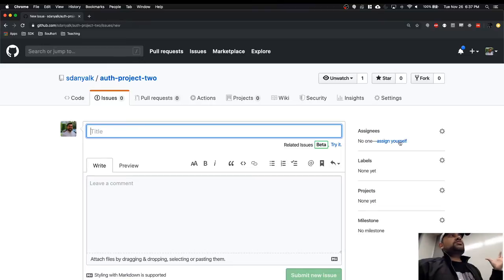If you're following Scrum methodology, what they say is that you have to divide your work in such a way that a single task can be completed in at most 2 weeks or less. Okay, so every 2 weeks you're going to break down the task in such a manner. If you think that task is not going to be completed in 2 weeks, Scrum says that the task is too big, so you need to break it down further. You break it down into such a small quantity that you can complete the task in 2 weeks.